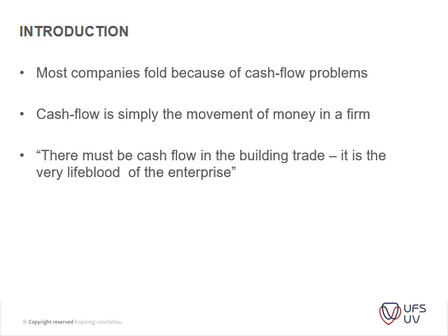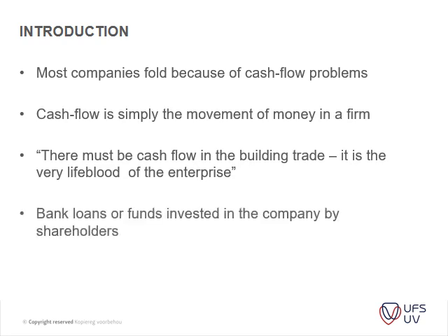Remember, during the workshop and during the lectures, I spoke extensively about your capital outlay and your deficit of only getting your payment after the second month after you've already started with your work. So you have to carry the project for a while. It's important for you to grasp that I need to take out a loan or have credit to carry the project while I'm waiting for my income. Bank loans, or funds invested in a company by the shareholders.